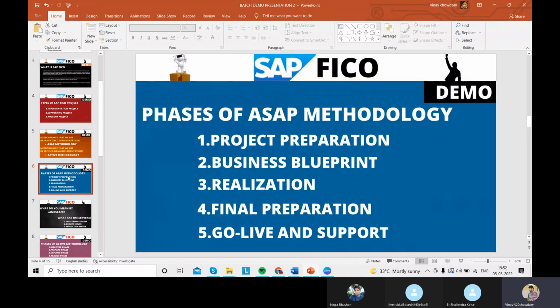See here, what are cutover activities? Here there will be cutover activities: uploading all the master data and open transaction data from legacy to SAP. Legacy means non-SAP, right? That is client data only. Here, what is our role in the cutover activities? I mean, what are the financial consultants' and CO consultants' roles? We list them out in an Excel sheet.